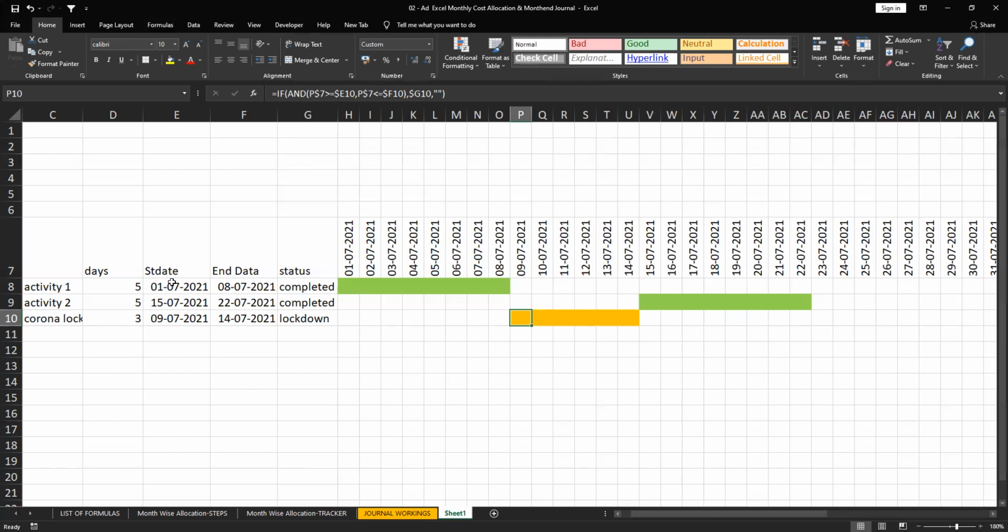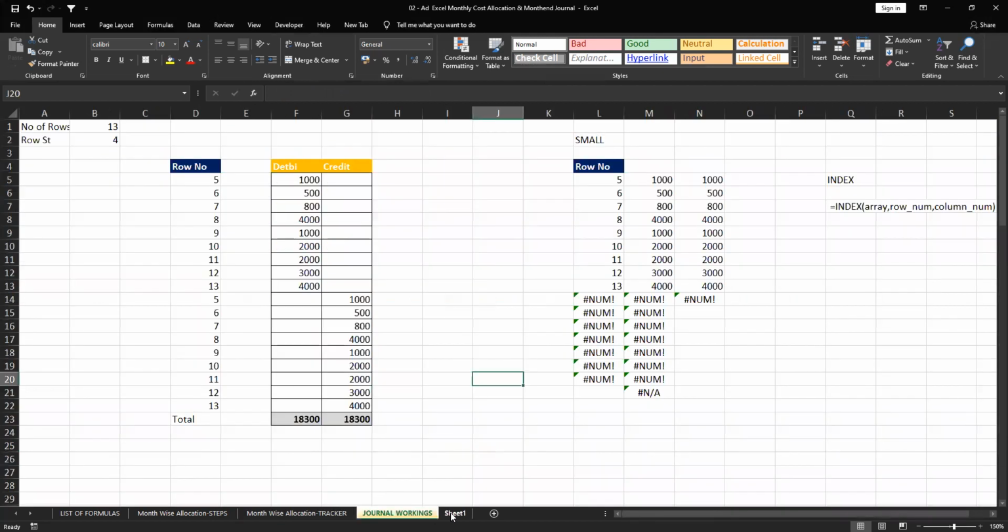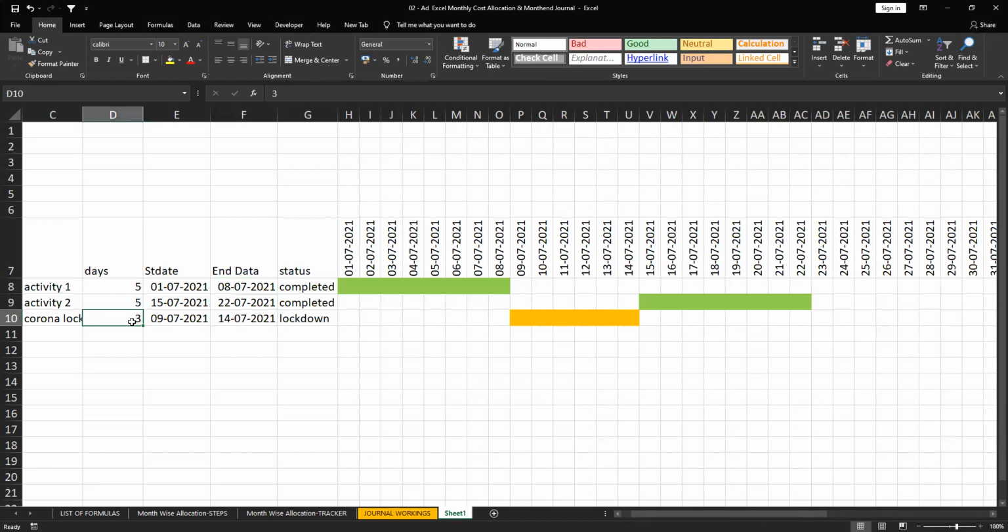Okay, so the only thing is start date and number of working days. Yes, automatically. This is what we need; the same logic we need to apply. And then you are giving 3 days, it is taking 5 days. What is the logic of this? So the 3 working days. So here, what day? It's taking a week. Yeah, this is excluding weekends. That's the reason. 3 work days from the start day, 3 work days. The next work day will come. Okay, like this.